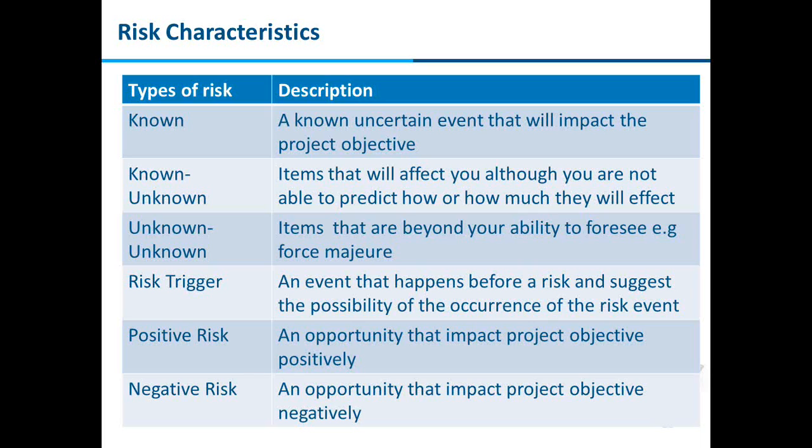Let's take an example of a risk trigger, related to estimates. All the organizations in IT are global, so the fluctuation of the dollar value has an impact on the entire estimate which we have done.